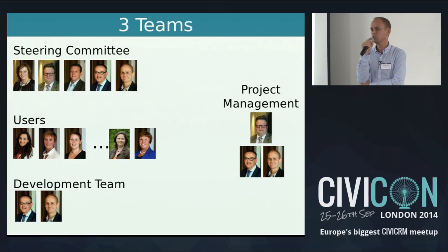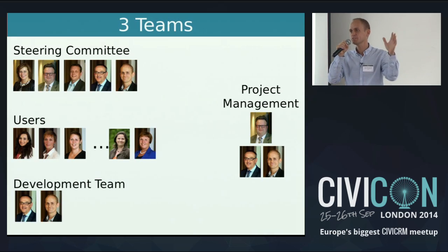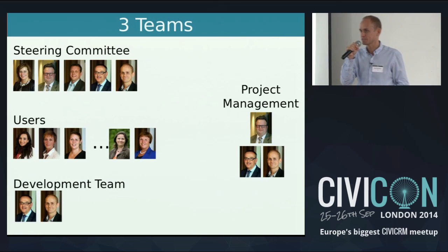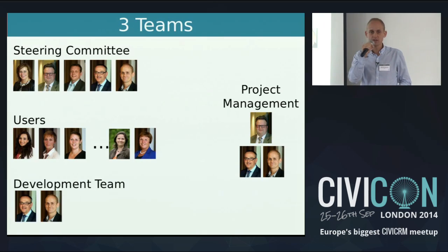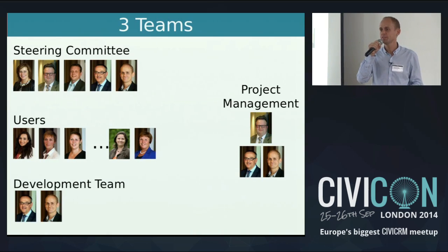But when we started the implementation, after 2 weeks or 3 weeks, I don't know, very early in the process, our gut feeling was that it would not succeed with that tool. And that the salesperson who told us everything was possible in that system was wrong, it was actually not possible with that system. And so we took a difficult decision of canceling that project. It cost us a lot of money, but it was better to stop at an early stage and lose money than put much more money in the system. It wasn't SAP, but it was that kind of horror story that we were going into, and we didn't want to do that.